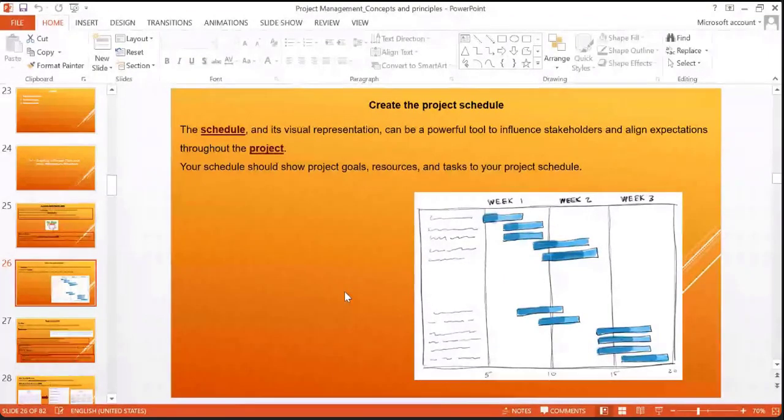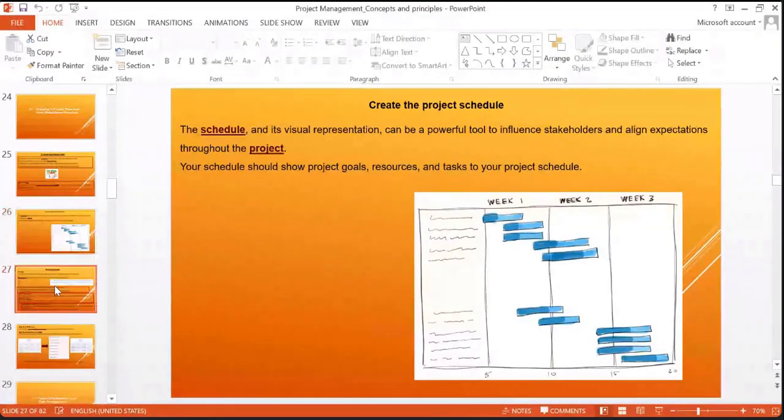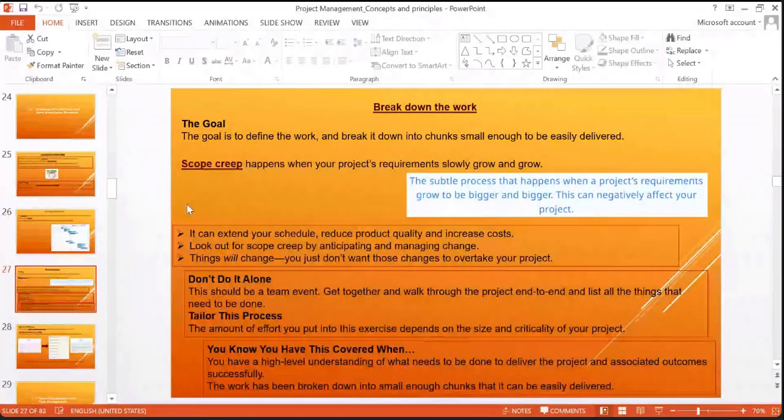So you will see on the left hand side some lines that can be any activities. For example, we discussed milestones against targets and dates, and you further distribute them into a number of weeks. For example, if you are starting any project, week number 1 may be to have staff on board, week number 2 maybe to train your staff, and then in week number 3 you will start your implementation and engage your key stakeholders. That can be your community members, your government stakeholders, counterparts, or any direct or indirect community member or beneficiary.